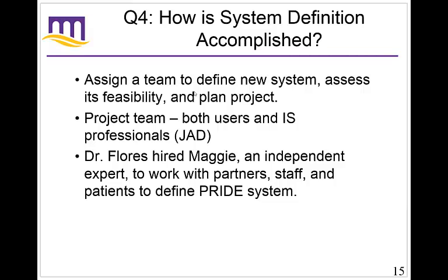Now, a steering committee will help in this process, but in order to get to the steering committee, you need to define what this system is going to do and assess if it is feasible. So you have to look at the technology. Does the technology exist? Is it something that the users would actually use? Is it something we can afford? So an economic feasibility. And it's not just can we afford it, but is putting money into this system better than putting money into a different system? But then also, if we go forward with this, do we have a plan for this project? Do we have the employee resources, or can we get a hold of consultants at a reasonable rate to do this?